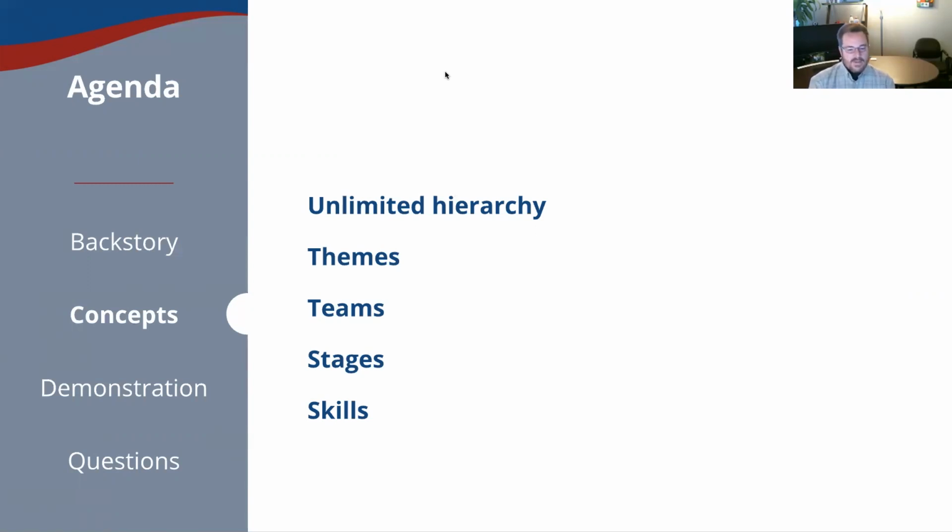And then we have skills, and here the idea is that within your teams, you can have different skills. I'm going to continue to use software development as an example here, although Portfolio applies to many other industries. But with skills, you might have some of your developers that are back-end developers and you have database skills. Other developers are really strong with automated testing and front-end development, or others could be focused solely on scripting. There are a number of skills that can be created, and these are really important when you start talking about scheduling and planning, because you need to have the right skills available to execute the work, and that's an important concept. So all of these are really fundamental to using Portfolio.